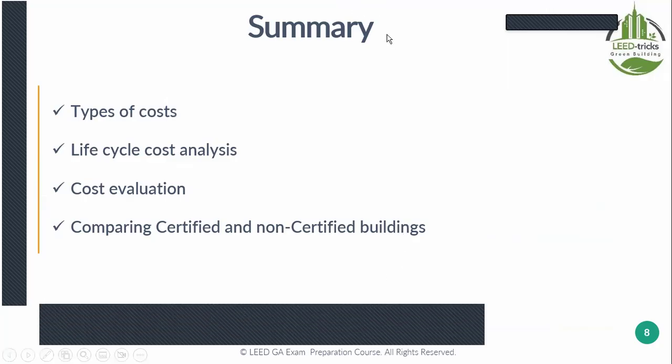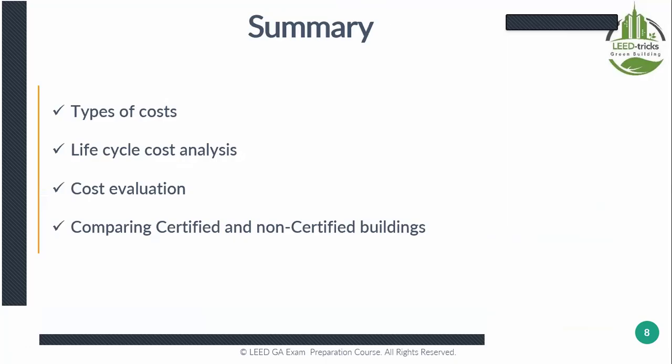1% to 2% is the additional cost if you want a really realistic number. During the LEED projects I worked on, we even achieved less than 1%. We never add budget for LEED, except for the consultancy service and the fees for the certification that we pay to the organization. In the real situation in all projects, they don't consider a specific budget for LEED.